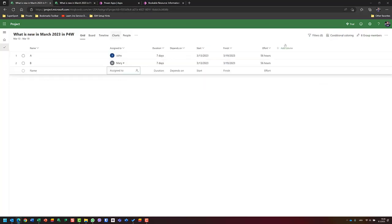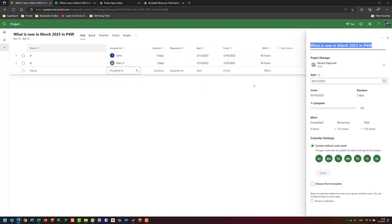Those seven days are fulfilled from Monday to Sunday because in my project settings I chose not to use resource calendars, and instead set everyone to work the full week — Monday through Sunday. So the entire week is working time.